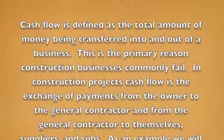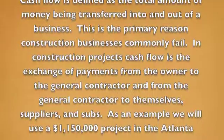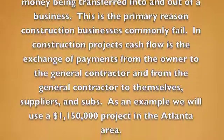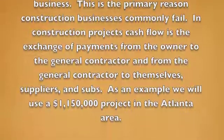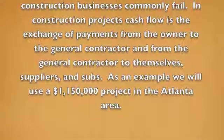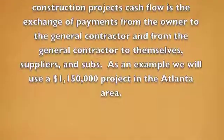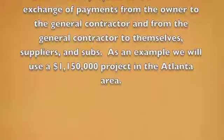In construction projects, cash flow is the exchange of payments from the owner to the general contractor and from the general contractor to themselves, suppliers, and subs.